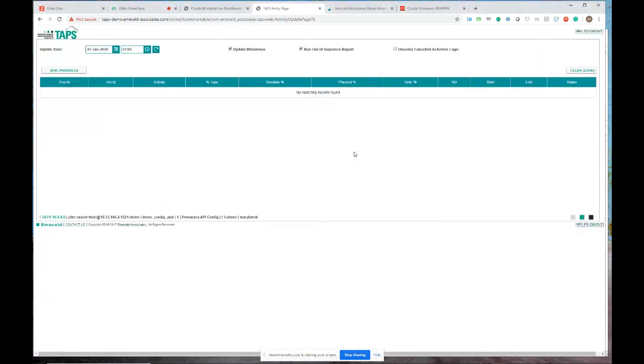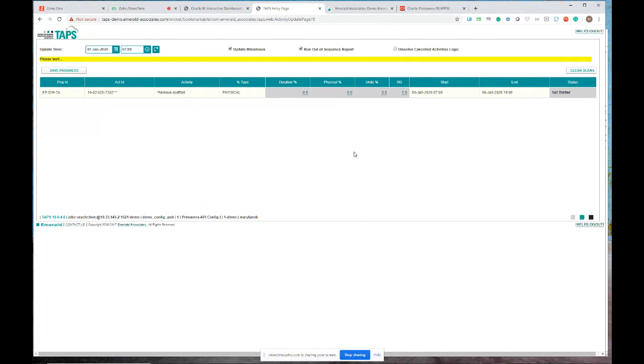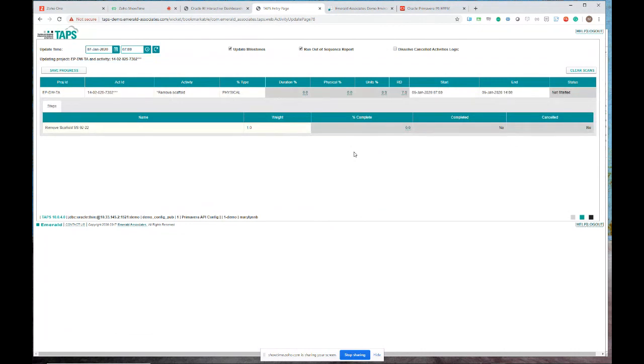So if I scan my activity, and I want to update this particular one a little differently than what we did the first time, and I want to use steps, I can go in and I can scan a step, and I can say, is it complete? Is it not complete? So this one, 50%.